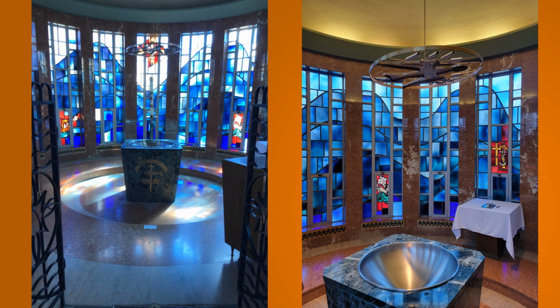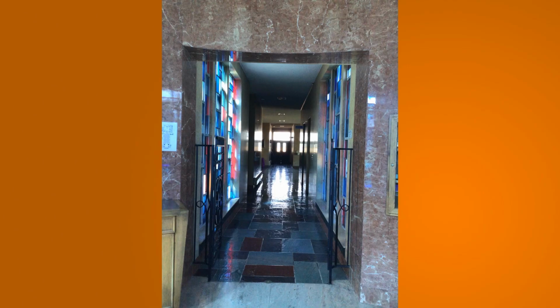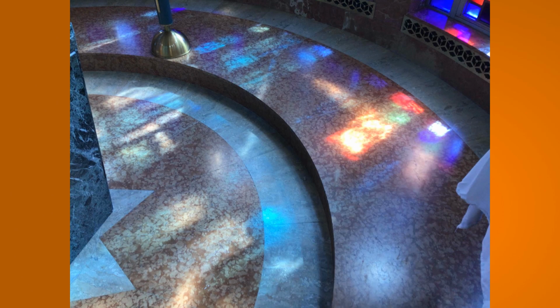After award, Rangel Construction began investigating the materials and components of the round baptistry structure, as well as the original blueprint drawings from 1950. It was concluded that the structure could not be lifted in whole and relocated. The roof of the baptistry is a cast-in-place concrete dome, which is supported by carved stone fins as well as common masonry units. This masonry support system was placed in a circular colonnade, with stained glass windows in between each support. There was also a short connecting hallway between the main church and the baptistry, which was scheduled to be demolished but required consideration since it tied into the baptistry roof.